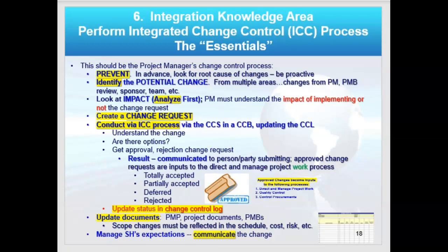Okay, so this is kind of a layman's approach, but it's still very accurate, and I would know the flow here for the exam. You want to always, as a project member, remember you're proactive, prevent the change from happening. But if you can't do that, identify the potential change. Look at the impact. Project managers, if you're offered this on the exam, you analyze first. If it's an option, you always analyze first before you do. Analyzing can happen quickly, but you analyze first.